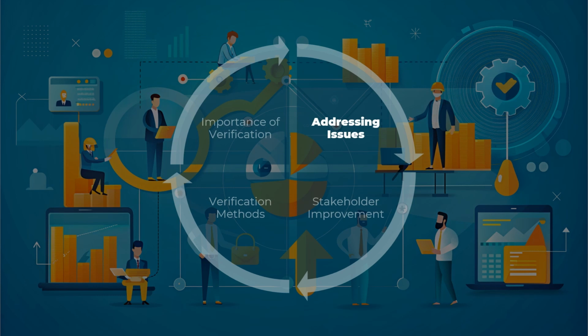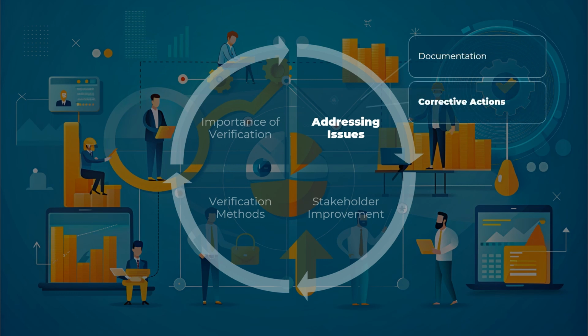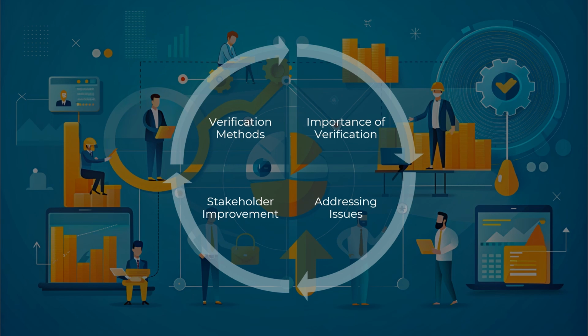During verification, issues may arise that need to be addressed. Documenting these issues is the first step, which involves noting discrepancies and areas of concern. Next, corrective actions must be taken to resolve these issues, ensuring that the project deliverables meet the required standards and specifications.